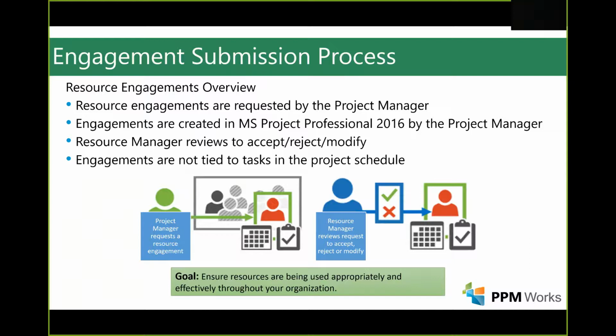Now this is really up to you and the organization if you want to do the complete life cycle of what Microsoft has provided for you, which is that top-down planning or the request mechanism called resource engagements. Now you can start, and we're actually going to start with the project manager today in Microsoft Project Professional, creating a request and saying, hey, team, organization, maybe resource manager, I would like these specific roles. So I'd like to create a quick project, throw in a bunch of resources. I'm not really sure where I'm going to decompose and what even tasks they're going to do, but I just want to get this process started.